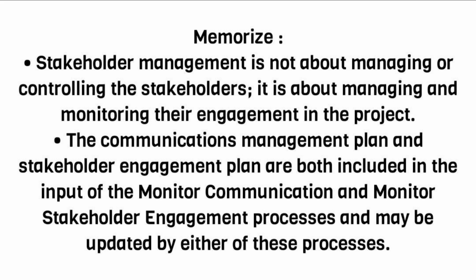Memorize. Stakeholder management is not about managing or controlling the stakeholders, it is about managing and monitoring their engagement in the project. The Communications Management Plan and Stakeholder Engagement Plan are both included in the input of the monitor communication and monitor stakeholder engagement processes and may be updated by either of these processes.